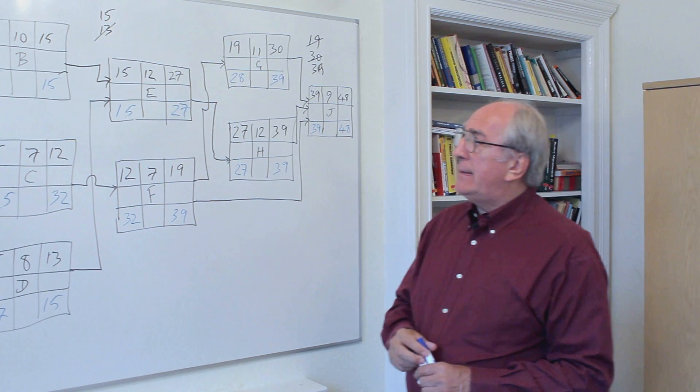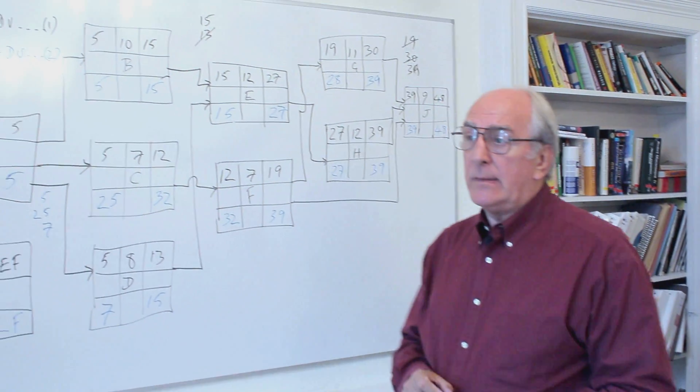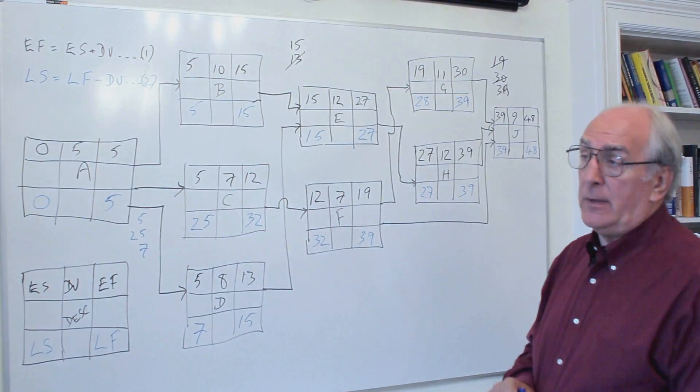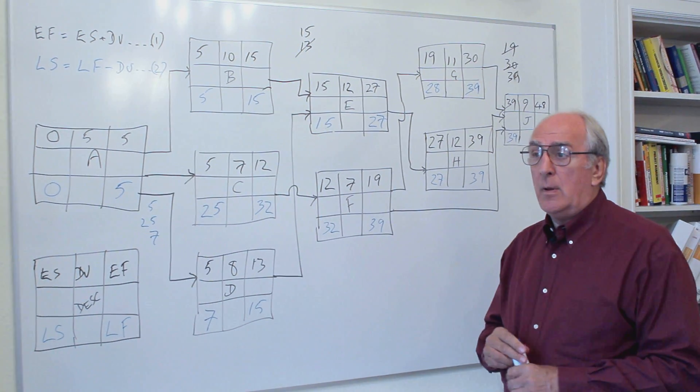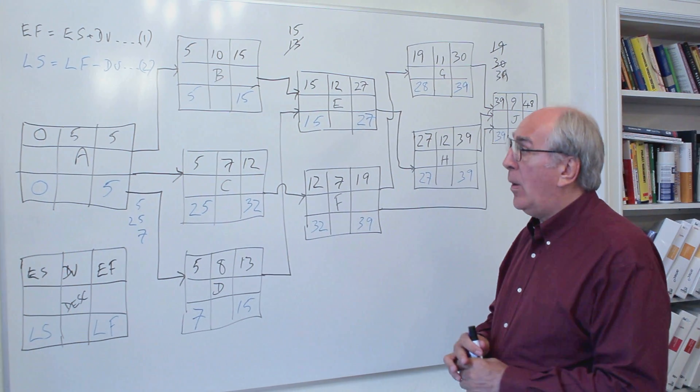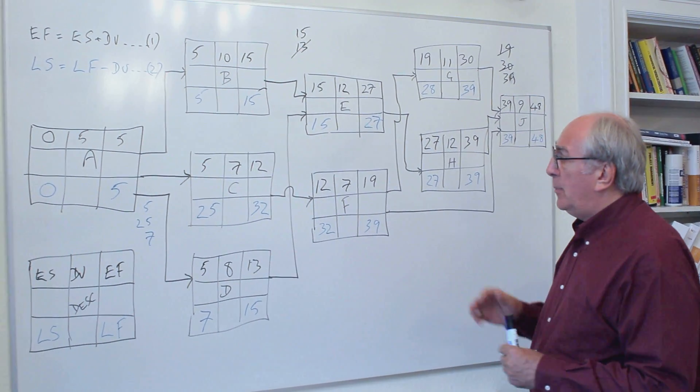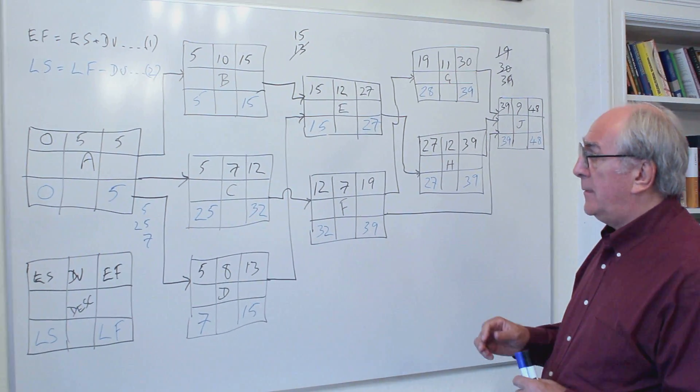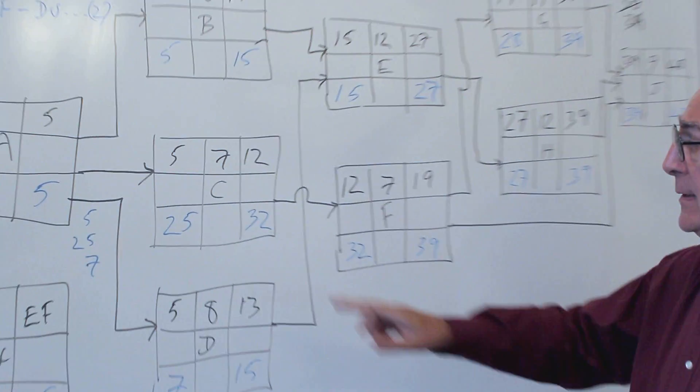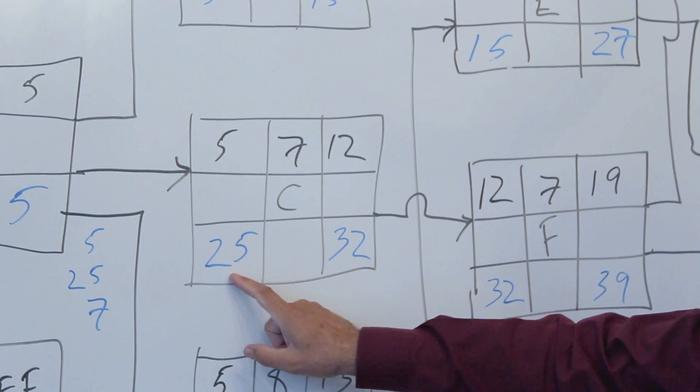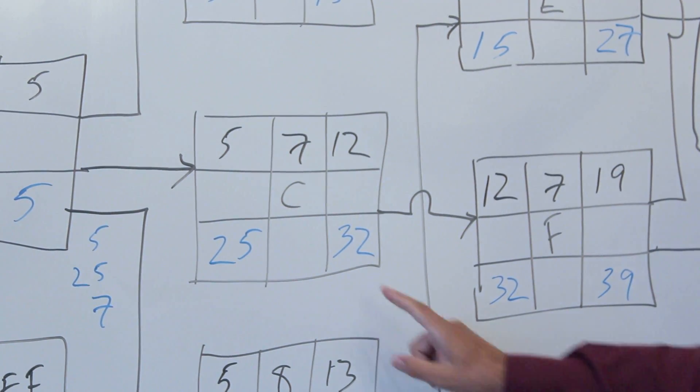What we notice is that the late starts and the early starts are different in some activities and in other activities they're the same. What does that mean? Well, if we think about it, for example activity C: its early start is 5, its early finish is 12, but its late start is 25 and its late finish is 32.